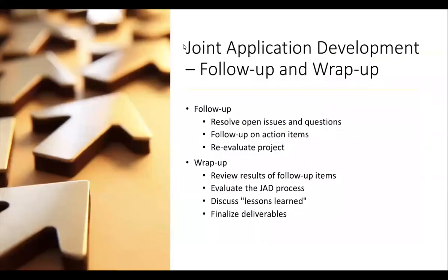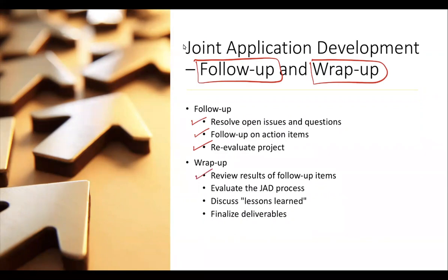Once the working session is completed, you need to follow up and wrap up. In follow-up, you need to resolve open issues and questions. You need to follow up on action items and reevaluate the project. When wrapping up, you need to review results of follow-up items to evaluate the JAD process and discuss the main lessons that we have learned. And of course, finalize the deliverables.